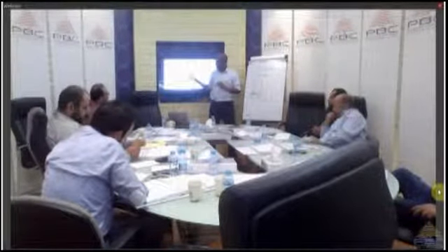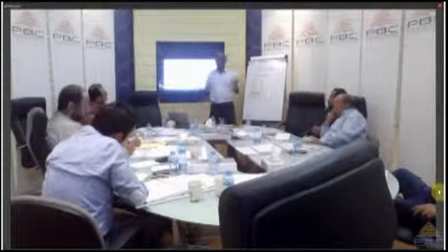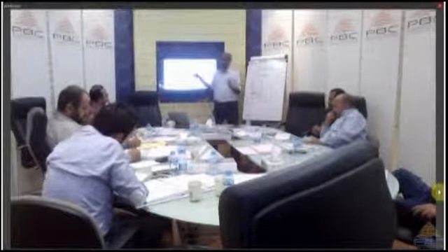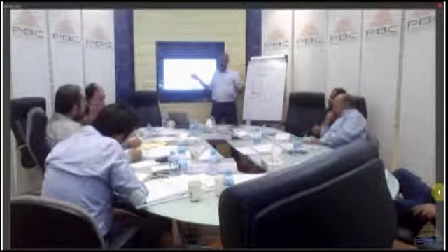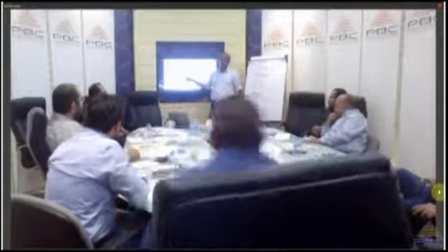Now this is suitable for, as I said, long-term projects. But if you have a 2-year project and you try to make your organization a project-type organization, it's disastrous. Because there'll be a conflict of interest. What's the conflict of interest? They don't want the project to finish.